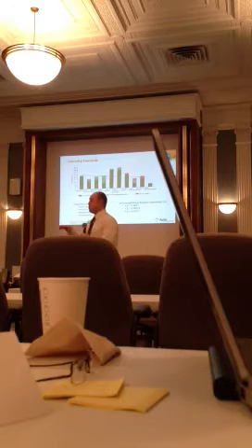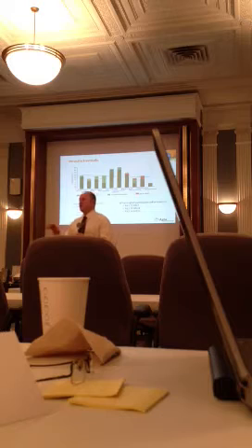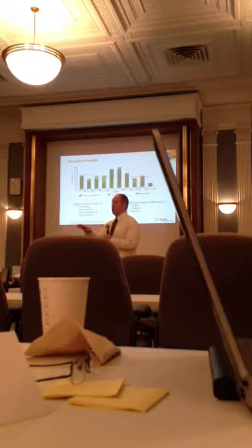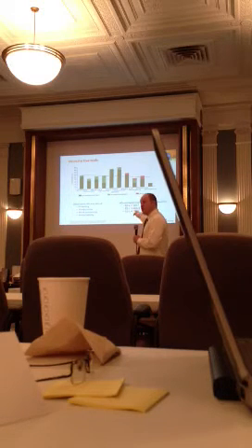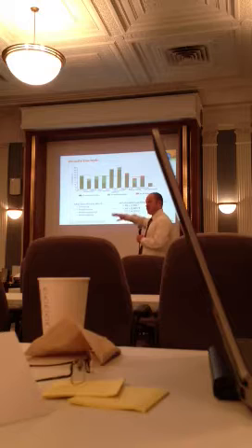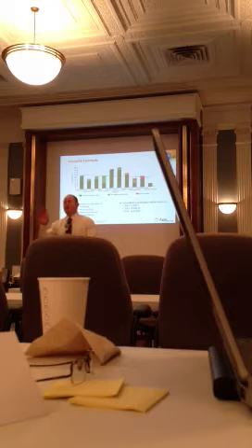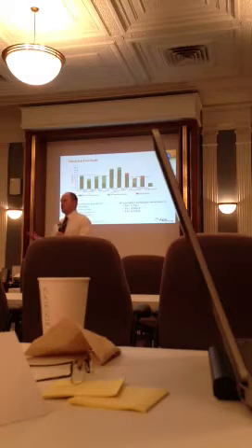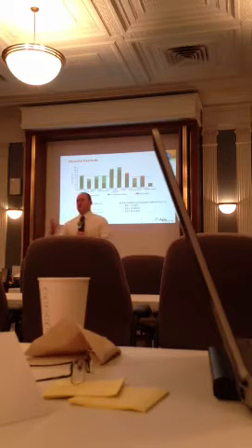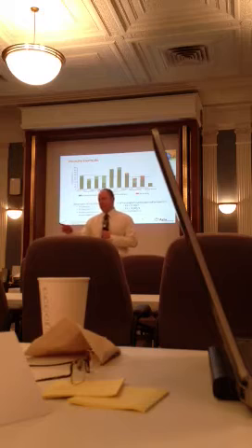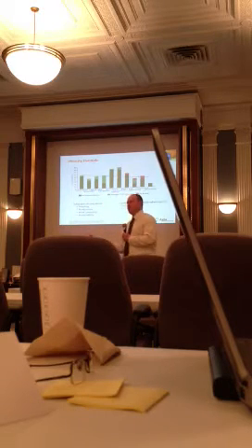Right, we have close to 120 story points. So it's 20 additional plus the 100 we're committing to. Because you can't just move them over once you've committed to them. Once you've committed to them for an iteration, they stay in that iteration unless for some reason they change. Right, and then they potentially become a new user story or something. So that was a good question. I'm going to get back to my other question.